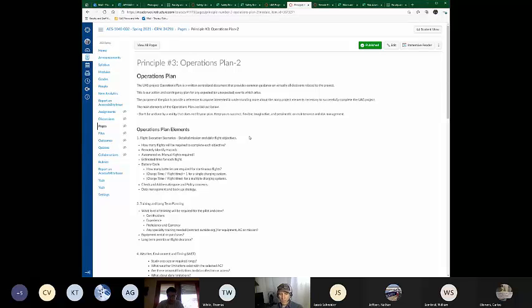Because I mentioned that when we're dealing with UAS projects, we could spend a year or more preparing for the project, all right? We go out and spend maybe a week flying the UAS and collecting the data. Then we might spend a couple of months or more developing data products, doing analysis, and working all that into a report that we're going to present to the client.